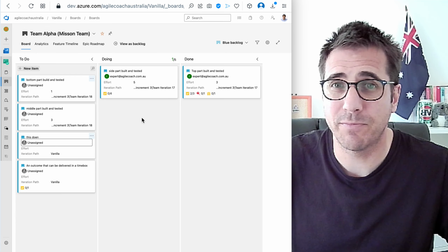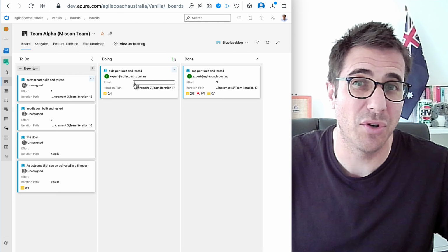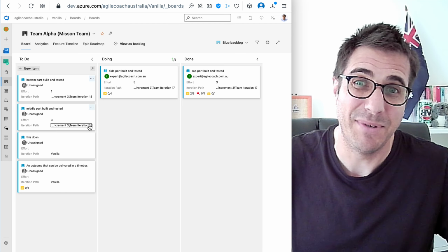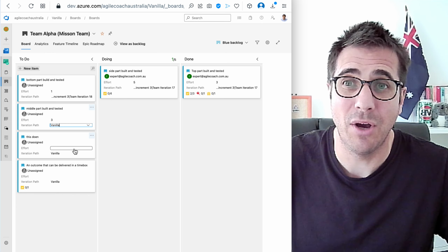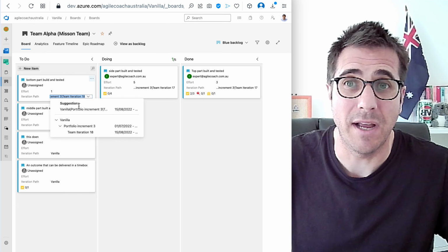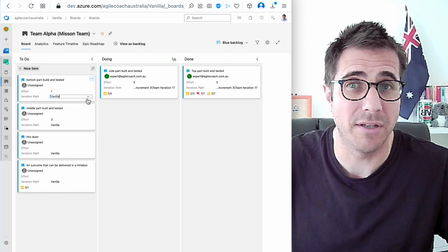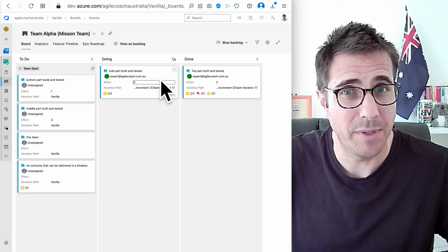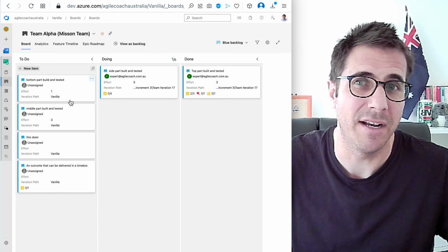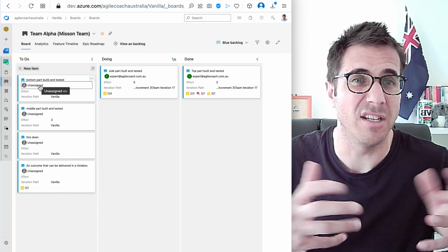So now when we're doing our sprint plan, we go, well, we got 3 done last sprint. We've still got these 5 to complete. To be honest, if I was a good delivery manager, I'd be putting these back on the backlog and saying, nah, no one's going to get these done. We've got 5 in there, we only got 3 done. Let's not overstretch ourselves. We've added an estimation session, we'll leave the estimates on. If we get this one completed, then we'll pull that one in. So that's the kind of thing you'd do. You'd also be assigning in your sprint planning book.